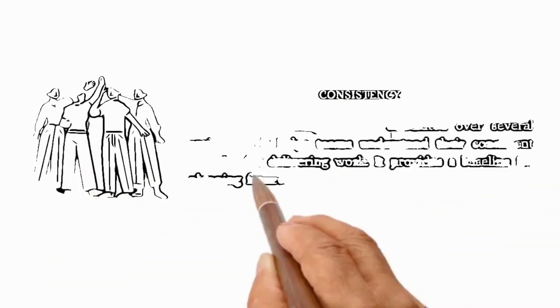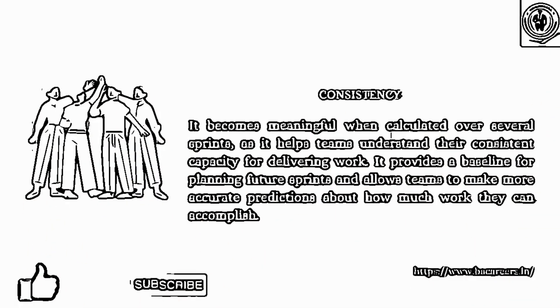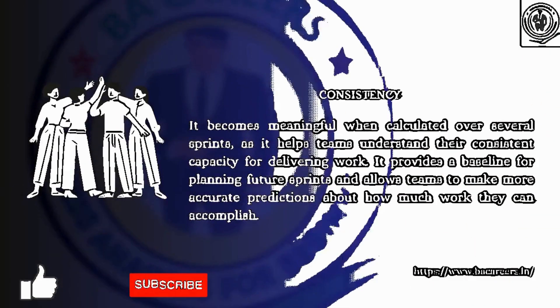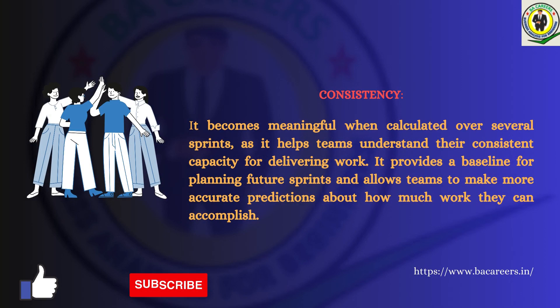Consistency: Velocity becomes meaningful when calculated over several sprints, as it helps teams understand their consistent capacity for delivering work. It provides a baseline for planning future sprints and allows teams to make more accurate predictions about how much work they can accomplish.